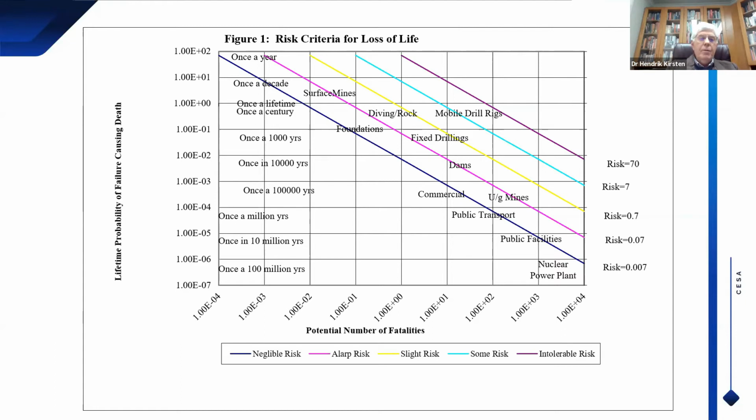Now, observe that the probabilities are given in very small numbers. Don't be alarmed by that, because that is how the financial and insurance industries work, on those scales. And you have to tie in with these two professions, because you're looking for project finance and insurance from those professions. Now, just look at the diagram and you'll see that risk is constant diagonally from bottom right to top left across the diagram.